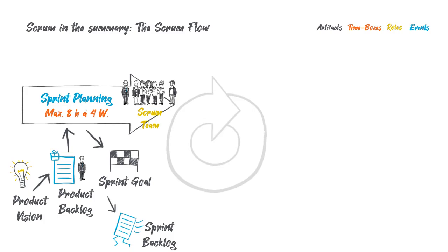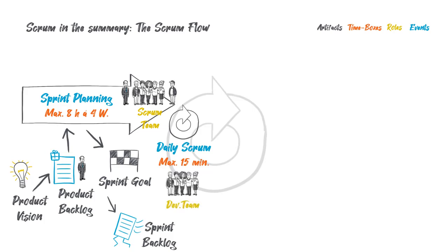During the daily work, the daily Scrum takes place. During the daily Scrum, the whole development team is present. The product owner is not present at this event. Only the Scrum Master is allowed to support the event and make sure that the team stays within the duration of 15 minutes. This event is about exchanging information within the team, creating transparency, and making decisions quickly when obstacles are identified. It's about creating synergies and collaboration in the development team so that the sprint goal can be achieved.